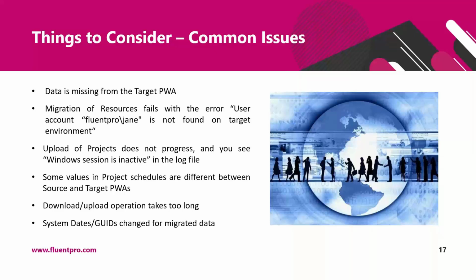And if this mapping is not done, or if it is done incorrectly and is not provided to FluentBooks, FluentBooks will try to enforce the source account during resource upload, and of course it will fail because such an account does not exist in the target Active Directory.